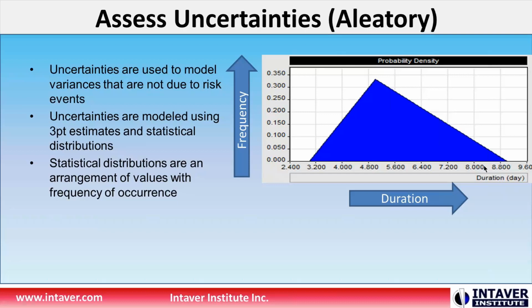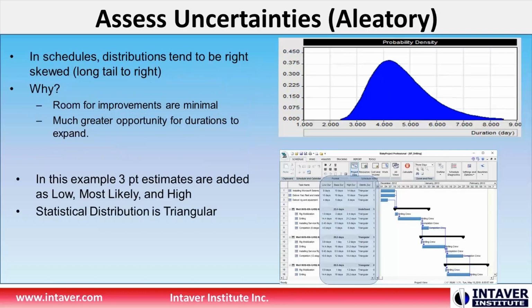So if we run 1,000 simulations, we'll probably only retrieve something right at the boundary values maybe once in 100 times, 1 in 100, 1% or 2%, based on how that distribution is created. So one of the things about schedules, and the reason I'm going to bring this up, is because it does have some of what I would call emerging risks that come just from larger schedules.